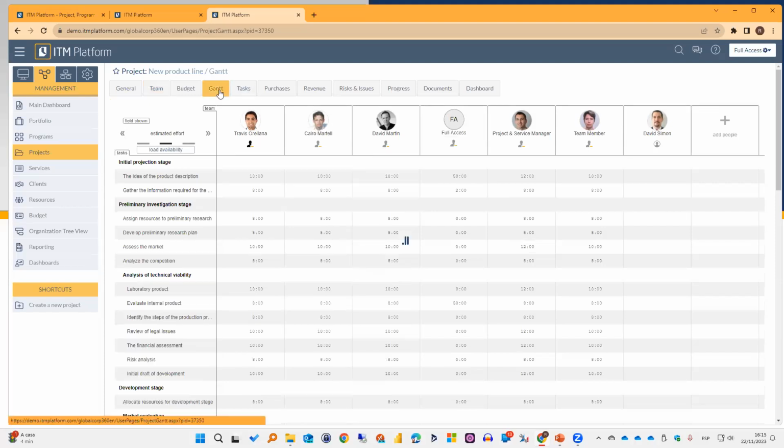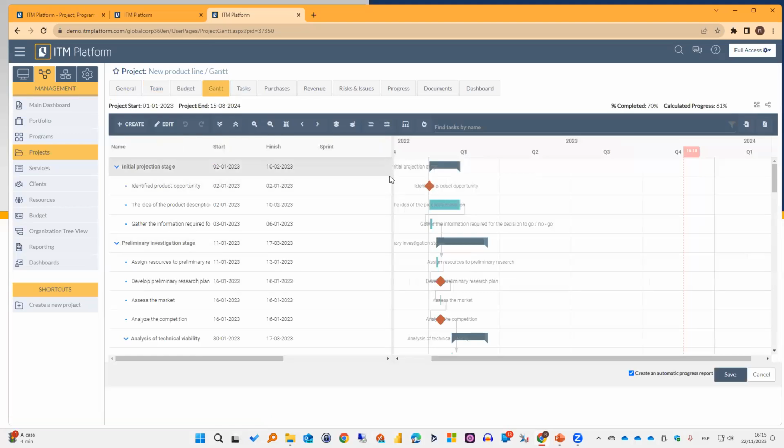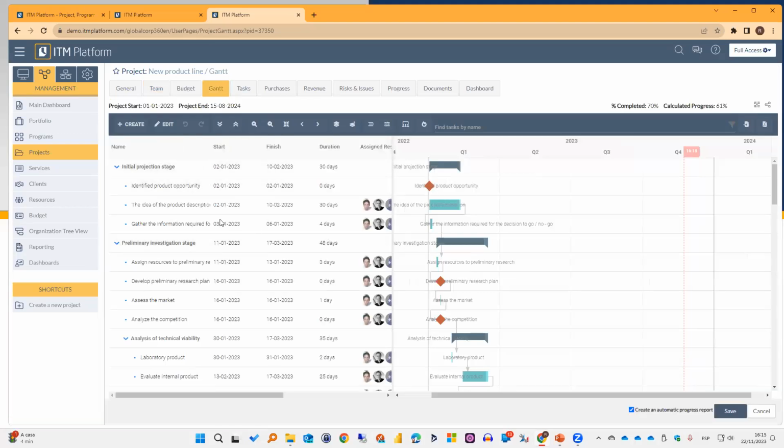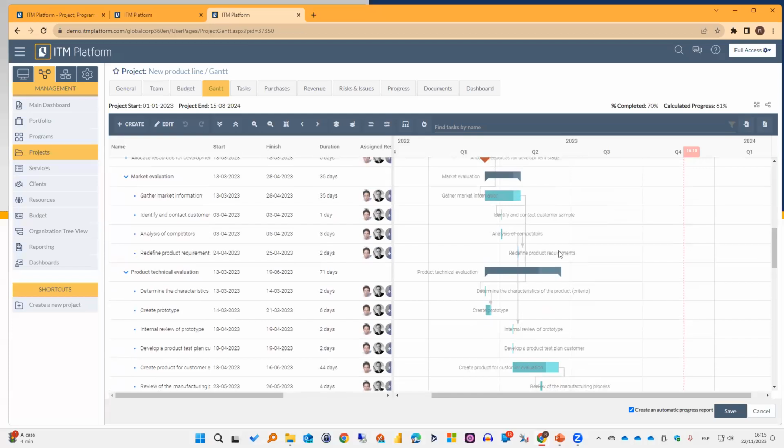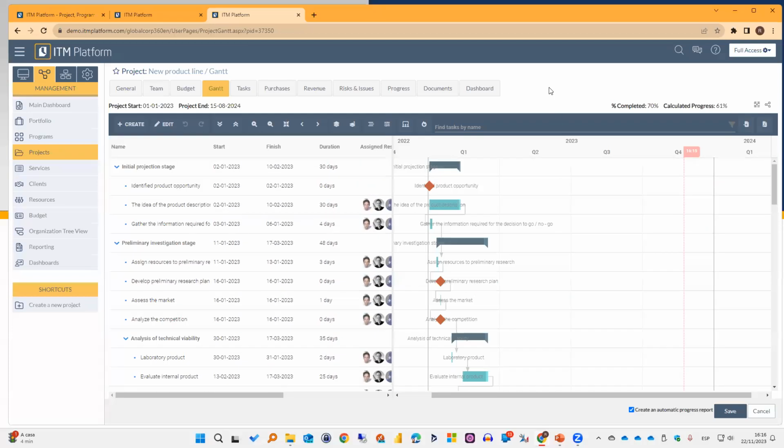But for example, what about the Gantt chart? What about the scheduling, right? How can I tell if a task is running late or is running early, right? I'm saving, I don't know, 1 or 2 weeks of the anticipated end date for my project. Maybe I'm running late. I'm going to finish 1 month after it was planned. Again, I need a point of comparison. I need a means to compare to that original previous plan. That is exactly what the baseline is for, okay?